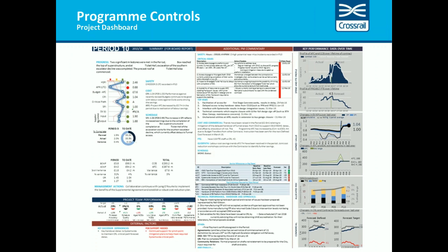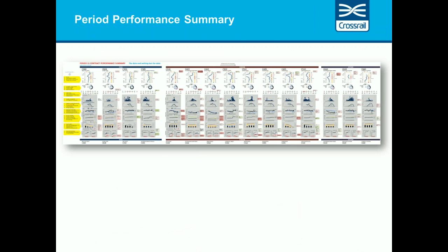We spend somewhere between 30 minutes and 45 minutes on each project, dissecting what has happened in the period. At the beginning of 2015, though, we started to, for the first time, show project performance information side by side on one page. And I will say, this has been a complete game changer in the sense that it's genuinely sparked interest in comparative analysis, and it's made people look at information in a way that they hadn't previously done so. So by visualizing each project, it's become very easy to spot problem areas and to highlight changes in performance and where on the program they have happened.